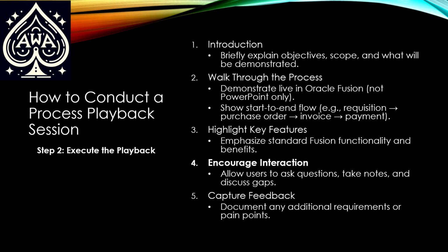As we said, take notes as you go through these, but most importantly, get the feedback. Yes, that worked for me. No, there's an issue there. Can we please revisit that? That supplier's wrong. This information's wrong. It's got to be documented. If it's a pain point, hey, this is going to take forever. Is there something you can do? Yes, let me take a look at it. Document it. You have to come back to this. If it's not written down, it didn't happen. So make sure all of this information that you get, the feedback you have, is documented someplace.